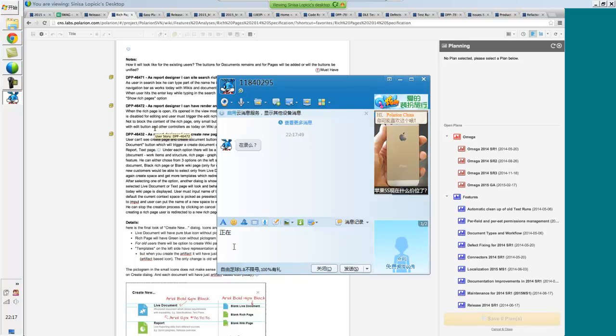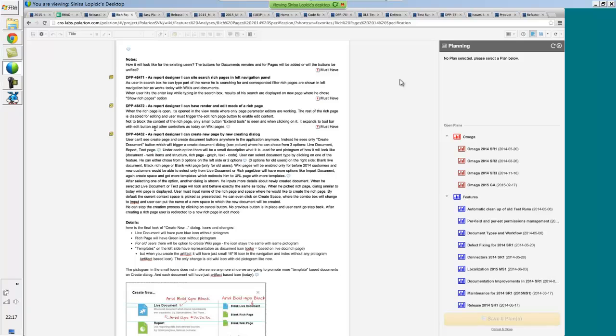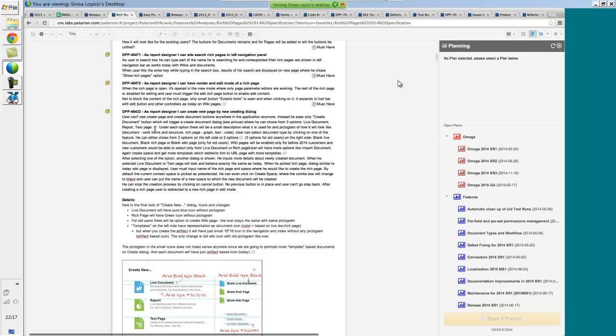I'm sure there are companies and teams that need a much more formal way of traceability and tracking, but for us, we're a bit more loosely coupled from this perspective. We also have a very short period between requirements and development start. Sometimes it's a matter of days, sometimes a matter of weeks. These are basically the reasons why we bypass the approvals process. For us, it's a bit too bureaucratic to use.